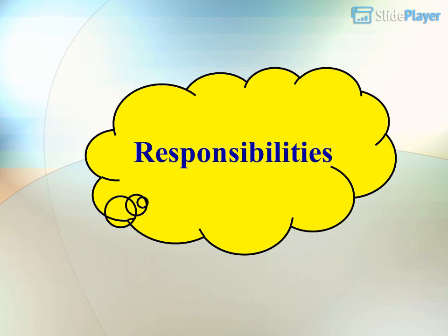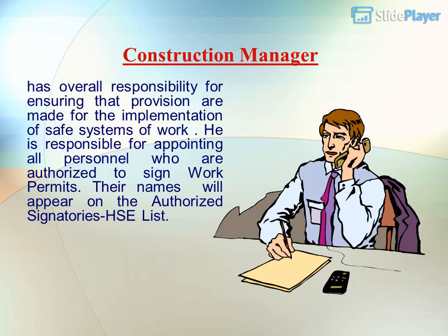Responsibilities. Construction Manager has overall responsibility for ensuring that provisions are made for the implementation of safe systems of work. He is responsible for appointing all personnel who are authorized to sign work permits. Their names will appear on the authorized signatories HSE list.